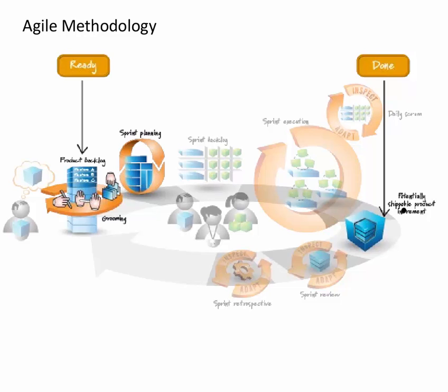The definition of ready and the definition of done are important concepts and the only real stable states during a given sprint. Work items for each sprint are pulled from a product backlog, and as the sprint executes, new functions are added to the project to address specific needs. During the sprint, daily scrums are held, during which current work is inspected and future work is adapted. At the end of a sprint, a new increment of the product is finalized and may or may not be shippable. Before a new sprint is ready, reviews and retrospectives occur to evaluate the process and the project.